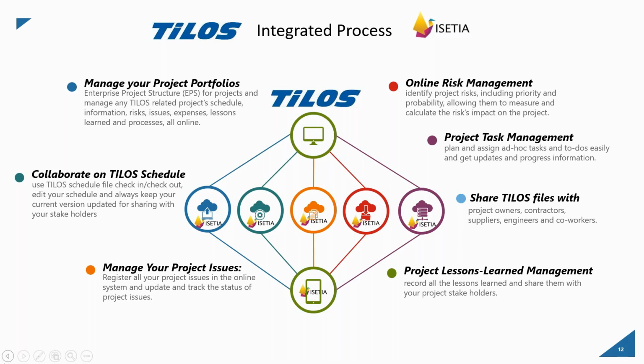We can categorize the issues, and issues can be a task assigned to someone, and you can track the status of the issues all the time. When was the issue identified, and who is responsible for these issues? What is the reaction? What is your plan for solving these issues? What negative impact do you have from these issues, and what documentation do you have in the issues? You can also attach and manage documents in the issues.